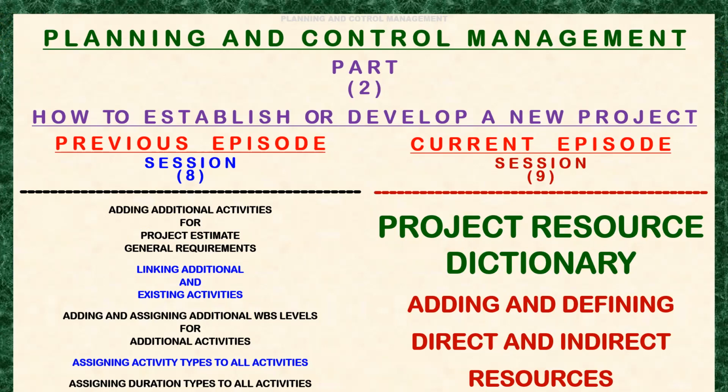Resources pertain to personnel and equipment to perform work on activities across all projects. That includes materials needed to build the project. And that is why it has 3 types, namely labor, non-labor, and materials. Personnel and equipment are labor and non-labor resources, which are time-based types, which could be reused or reutilized between activities and or projects.